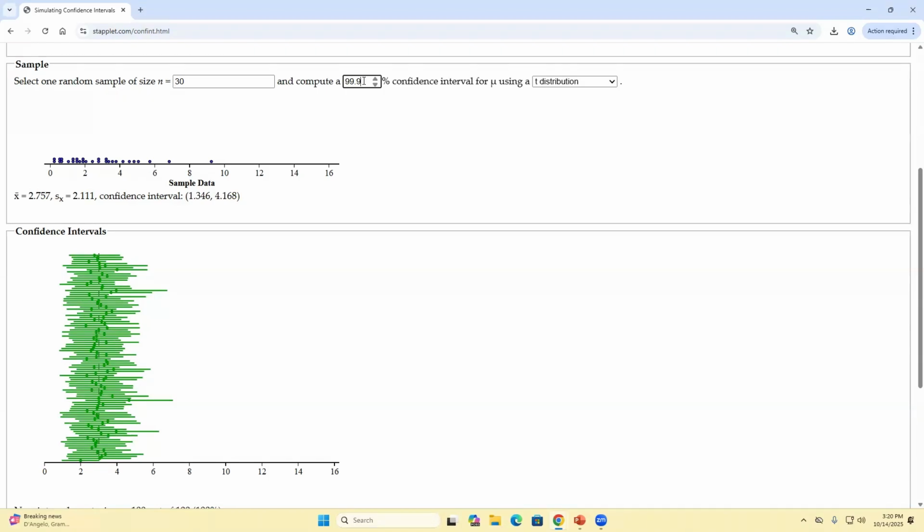So this again would be, just to put it back in that scenario of that project manager, if Dr. Rivera said, hey, you know what, I'm kind of laissez-faire, I just go with the flow, give me like a 75% confidence interval, Alex might say, oh, okay, well, 21 weeks is our best estimate. I'd say somewhere between 20 and 22 weeks, right? I'm about 75% confident we'll get it done in 20 to 22 weeks. But if she had a nervous collaborator who said, no, I need 95, then Alex might have to say, well, okay, anywhere between 17 to 25 weeks.